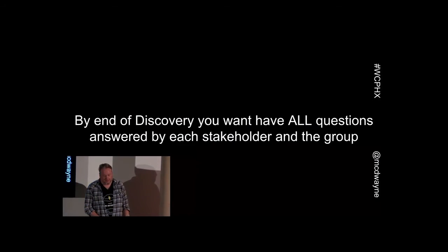It's a process. But by the end of discovery, you want to have all your questions answered, all of them, by each of the stakeholders in the group and the group itself. If you're dealing with a single client, this is super easy because it's one person. If you're dealing with a committee, you need to go in and actually interview them all and figure out what's going on with them. And you want to have your questions thoroughly answered before we get done with the discovery phase. Discovery's not the end of the project, it's a part of the project. And no, it's not 100% locked down. If you need to come back and rescope something later, know that you need to do another scoping exercise and a new discovery process.